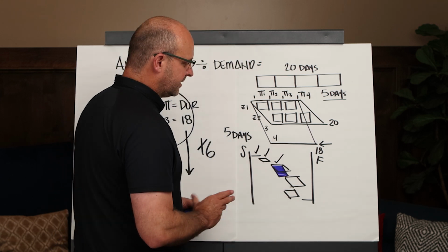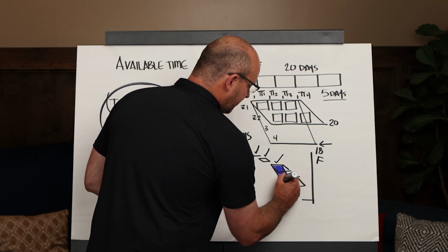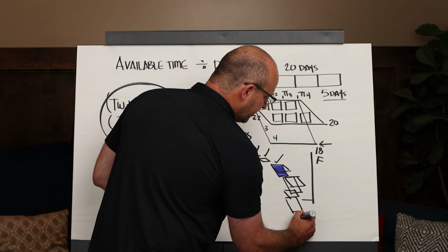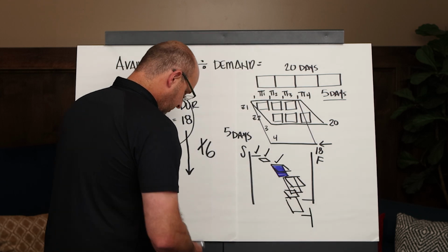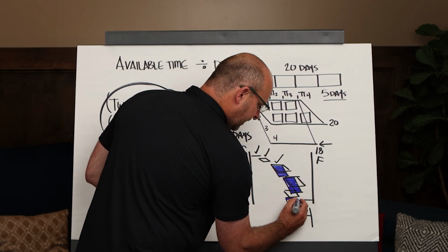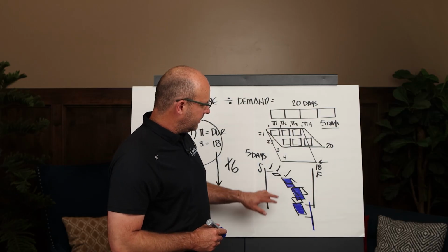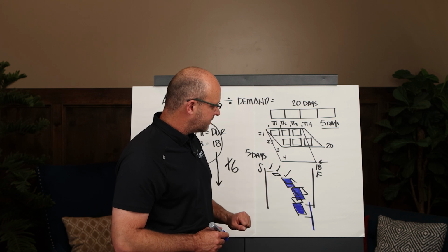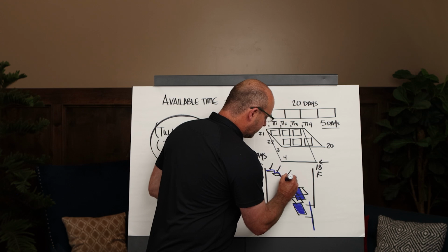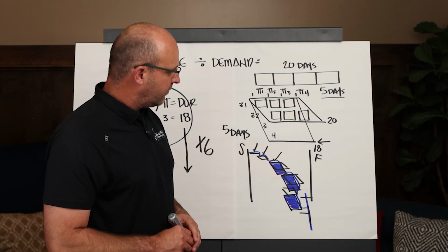And then we look at this other phase and we're like, yeah, instead of 8 zones, we could do 12 and speed it up. And then that same thing happens to this, and the same thing happens to the exterior, and then this whole production plan moves to the left. So let me draw that in blue so it's making sense. I like this. And then we have the new target. So what you're doing here, instead of the slower option, which I originally drew, is pulling all that back down. I can draw a blue line through this, pulling this back in because you're able to use this formula to bring it over here to the left.